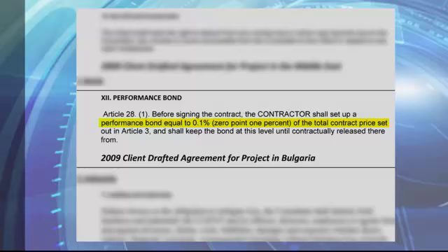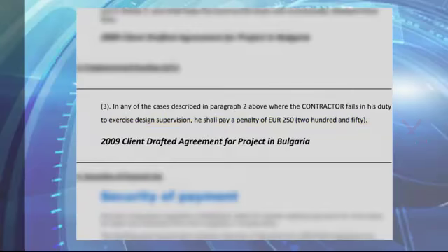Client-written contracts will often seek to transfer risk and liabilities that are uninsurable. For example, I've seen many contracts that include clauses involving predetermined penalties. One such example is a liquidated damages clause, which would allow the client to charge the architect a predetermined amount of money as compensation for a delay in service. Typically, the architect's professional indemnity insurance policy does not cover the architect for predetermined penalties, like liquidated damages. However, in the event of a breach, the PII policy will seek to cover the cost of the actual damage suffered by the client. So not only are the predetermined penalties uninsurable in most situations, but they are also unnecessary given that the client should already be covered under the architect's PII policy.